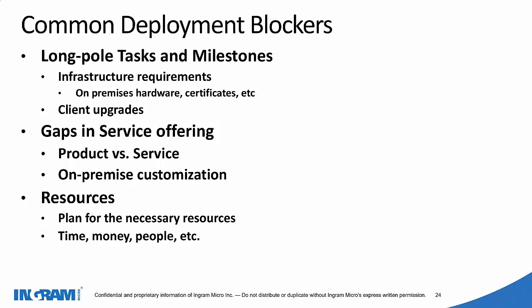For example, you will have the complete deployment chart in an Excel sheet, then the complete project plan in a Word file. And in the deployment guide, what add-on solutions you are giving, the complete deployment of Office 365, the SLA you are committing to your customer, what migration tools or methodologies you are going to use, plans for the customer, everything would be included in that deployment kit.